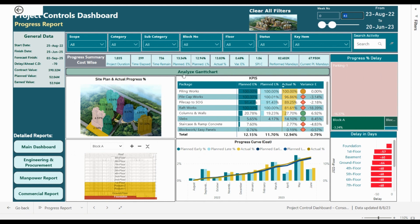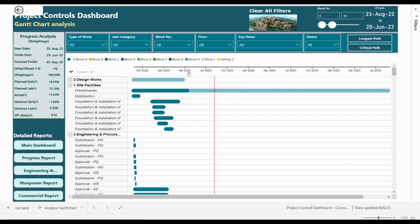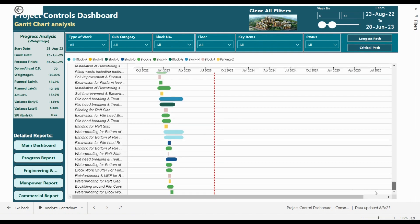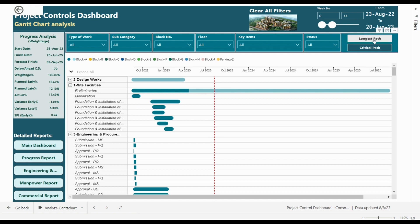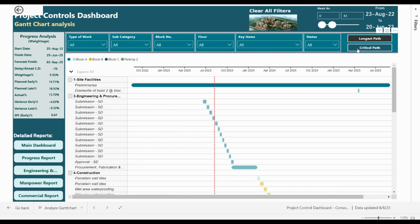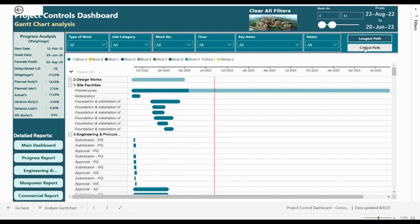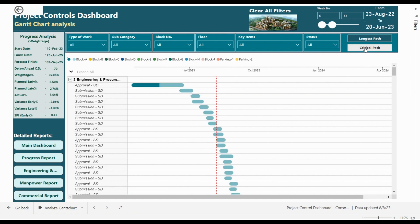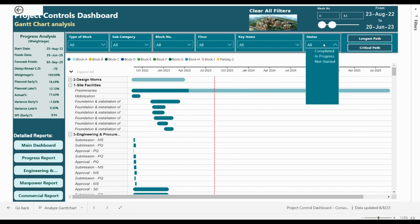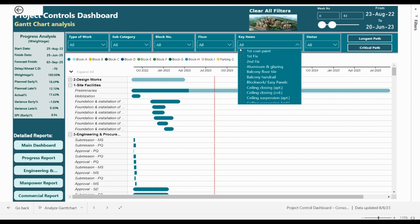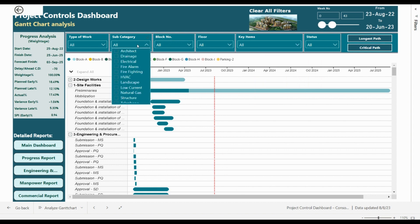You can also go to the detailed Gantt chart, which presents all the activities in Primavera. We can filter the longest path or the critical path, filter all completed activities, filter a specific activity in a specific floor and block, and filter by category as well.